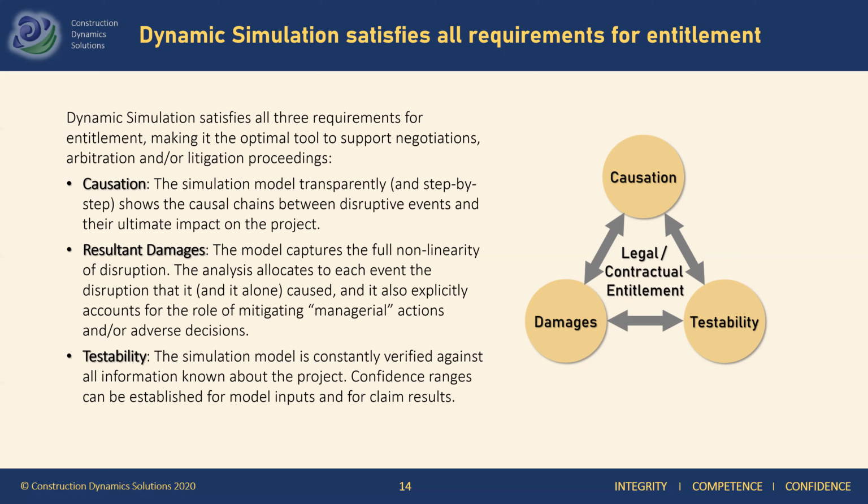Also, assessment methods have to quantify the resulting damages. Now, system dynamics models capture the full nonlinearity of disruption, all those consequences of the consequences of the consequences, keeping those from one event separate from those from all other events, and especially separating consequences for which the employer is responsible from those for which the contractor is.